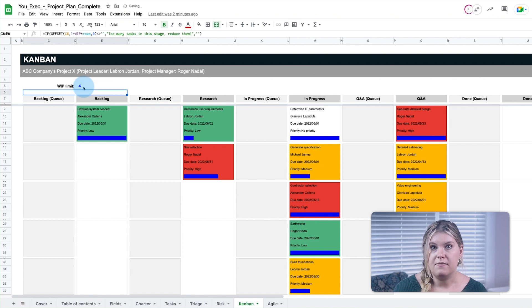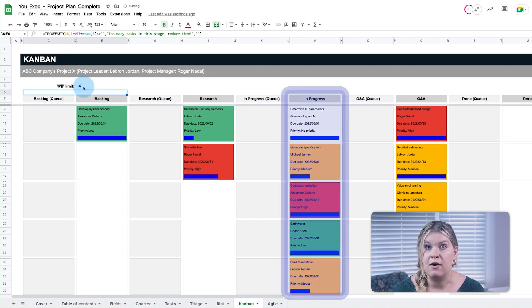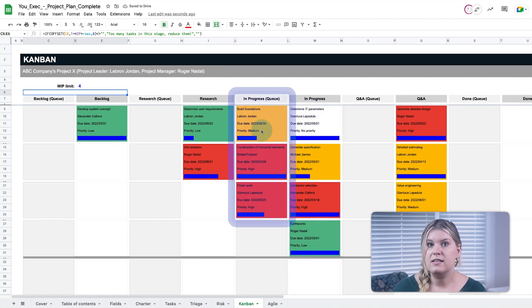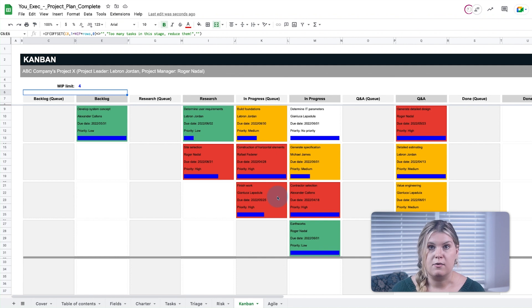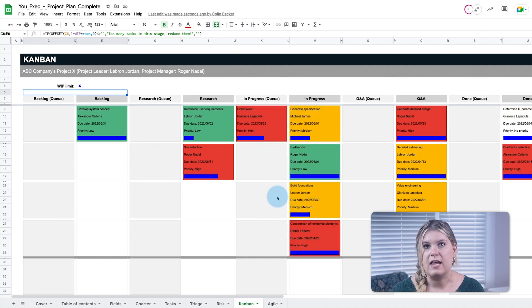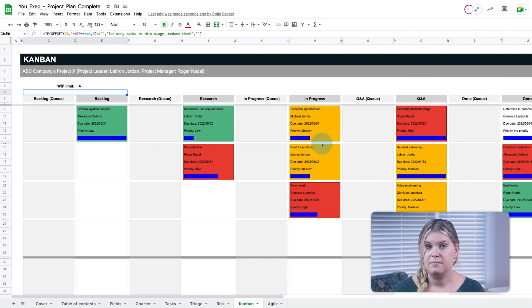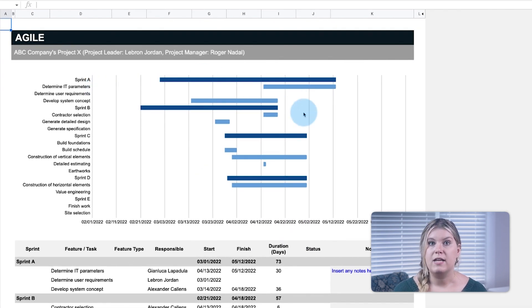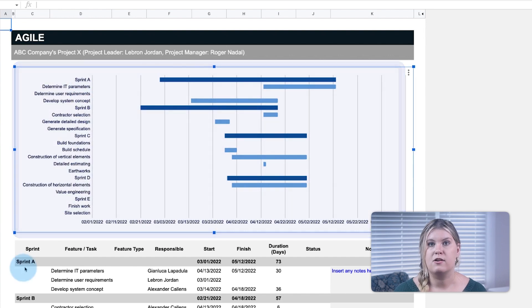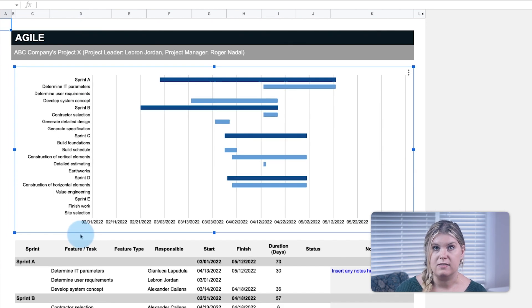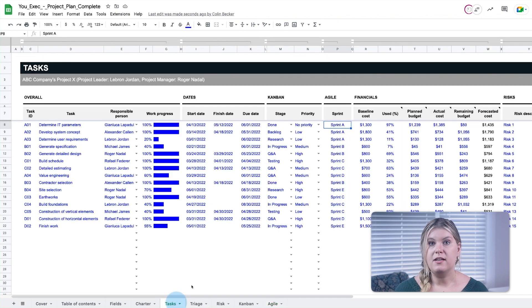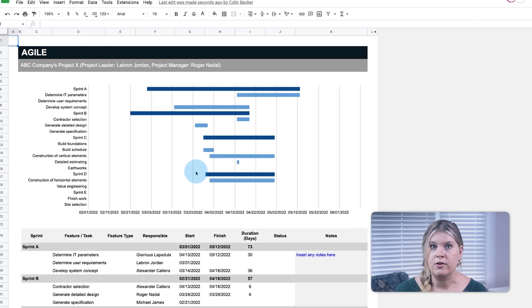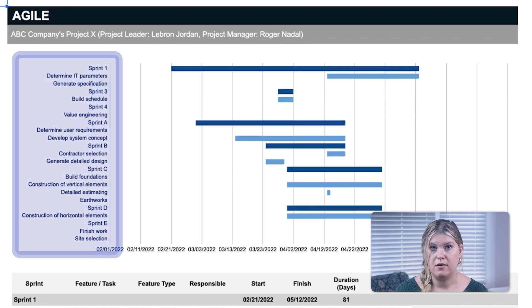If a specific stage exceeds the limit to the number of tasks allowed in that stage, the excess tasks are added to that stage's respective queue column. Items in the queue are then loaded back into the stage when other tasks are completed. While Kanban does work with the Agile management framework, the Agile tab provides a simple Gantt chart visualization to display tasks by their sprints. The sprints are defined on the task list and appear first by numerical order and then alphabetical order.